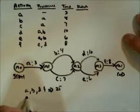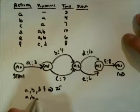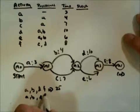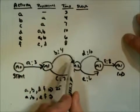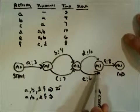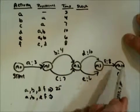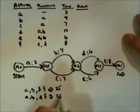Another route would be A through B, through E, and then through F would be 3 and 4 is 7. Down through E is 6 more is 13, and then F would be 21 units of time.